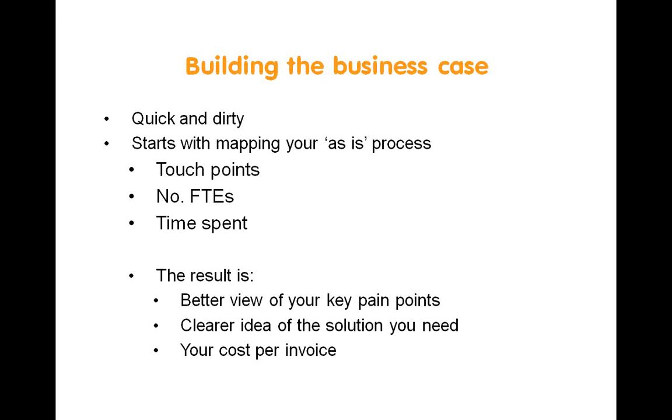When you get past the high-level business case, then you start looking at your as-is process and mapping it out. And this will really tell you how many touch points you have, how many FTEs are involved in the process, and how much time is actually spent. The result is a much clearer view of what your key pain points are, a clearer idea of the actual solution that you need, and it will boil it down to a very clear idea of what your cost per invoice is.